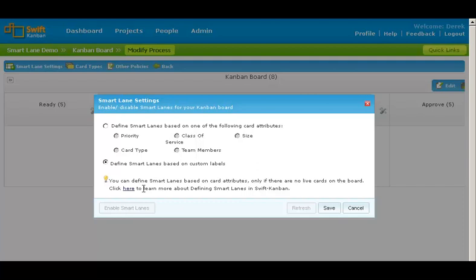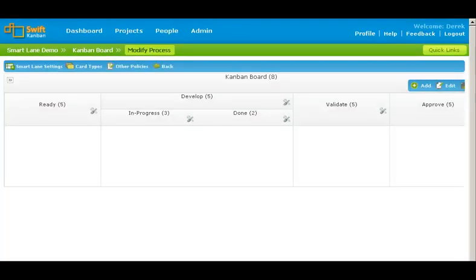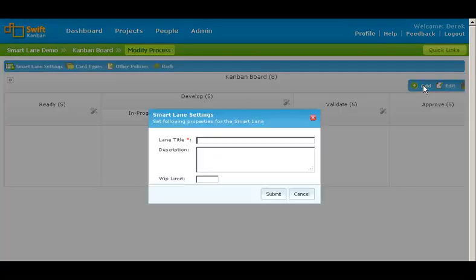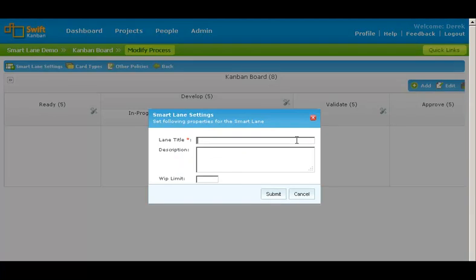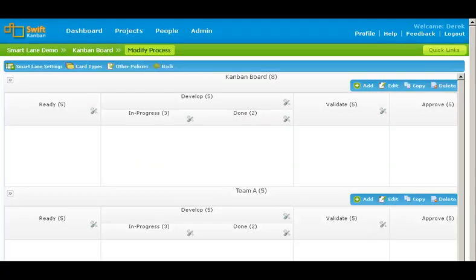If you select the second option, you can add multiple horizontal smart lanes. Let us save our choice and add a lane. Say we want to manage a workflow for team A. We will enter the WIP limit and save. Similarly, you can add more lanes and define a workflow for each lane.